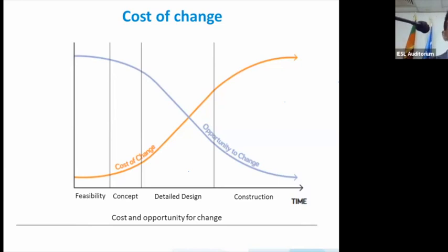I give an example that, as I mentioned, I've been working in the offshore sector as well, offshore engineering, and you get very harsh environments. You see the wind farms and some of the oil and gas platforms installed in the seabed, right? You know that installation cost is humongous, right? You need to spend about $500,000 US or $1 million US a day for a vessel. It depends on the vessel.